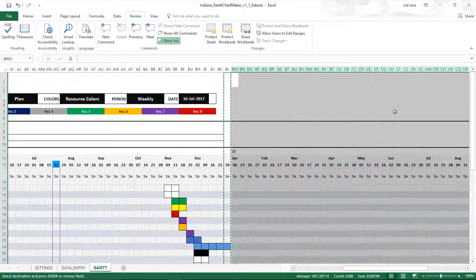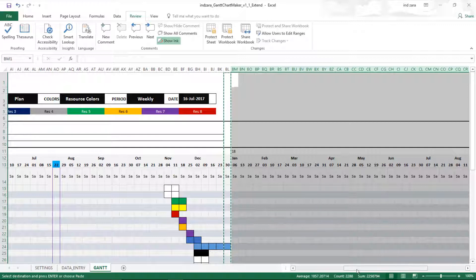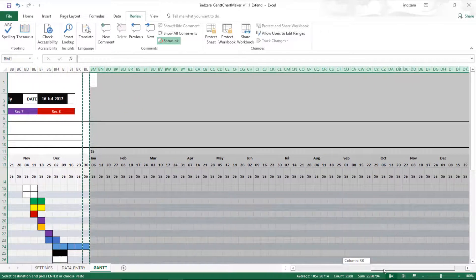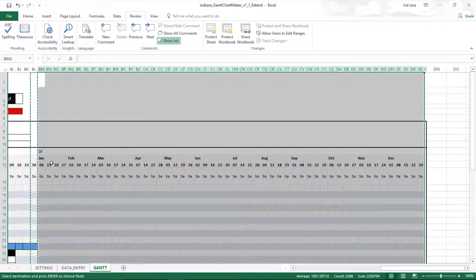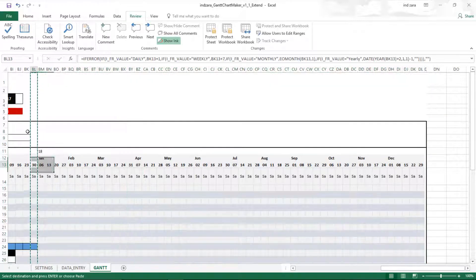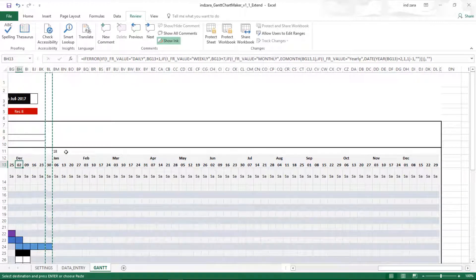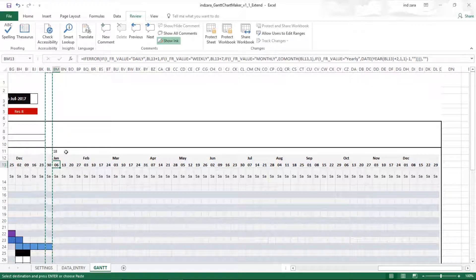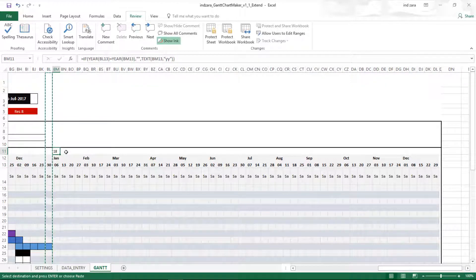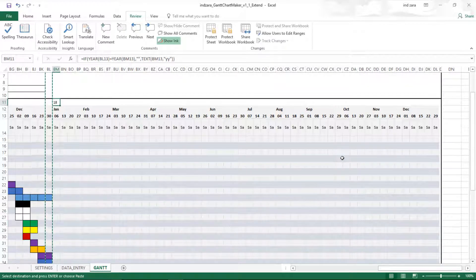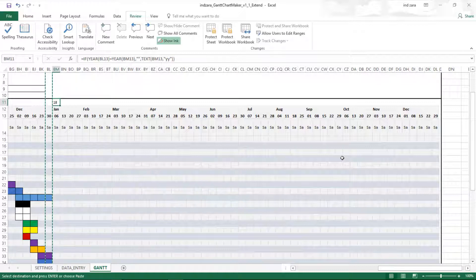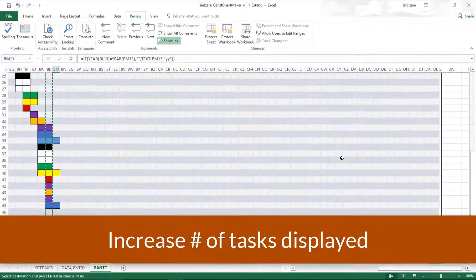Now you will see that from BL, we have added 52 more columns, and all the formulas and everything got added correctly. Here we have December, so we're looking at a weekly view—December 2nd, 9th, 16th, 30th, and then we have Jan 6th, 13th for the next year, 2018. It seems to be working fine. That's all you do to extend the number of columns beyond the 52 that you have by default.